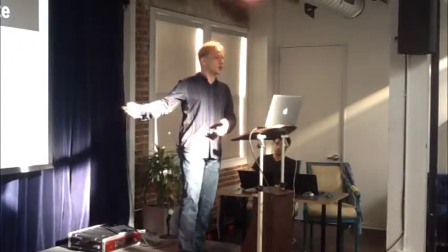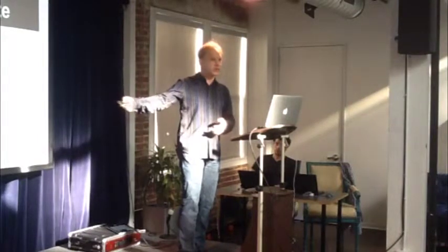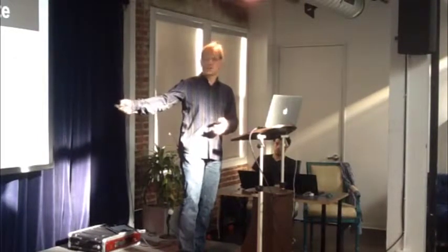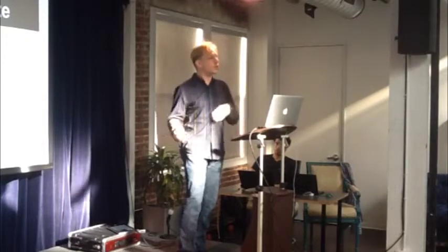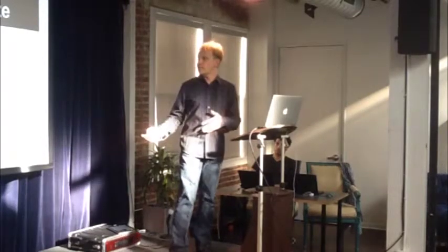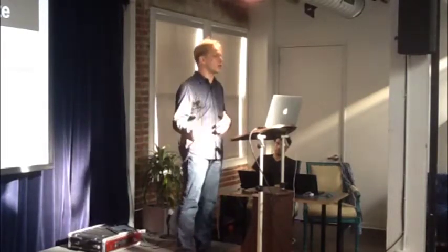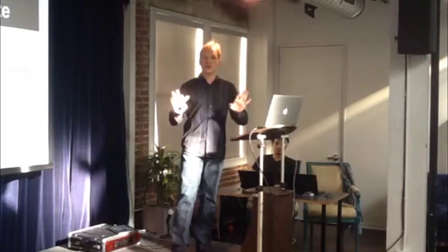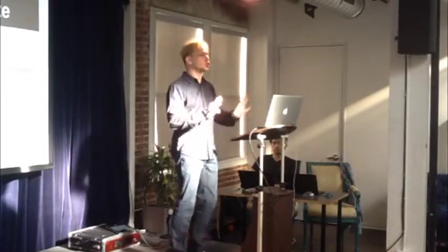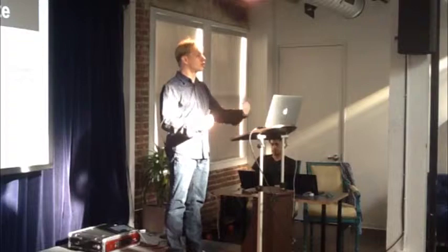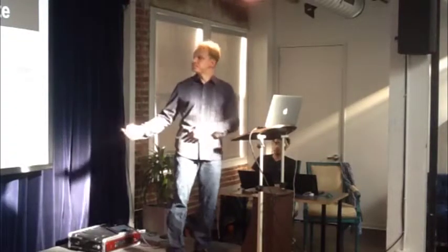But which number have you changed here? Have you changed the labor it's going to take to do the task? No, you've changed the estimate. And so the only thing you've accomplished by negotiating that estimate is increasing your own disappointment at the eventual outcome. So that's an effect I strongly encourage you to try and resist in yourself, which is to negotiate with an estimate.